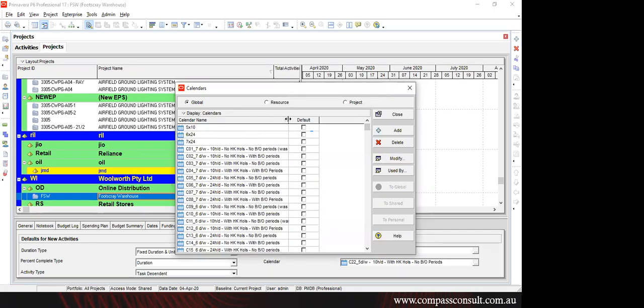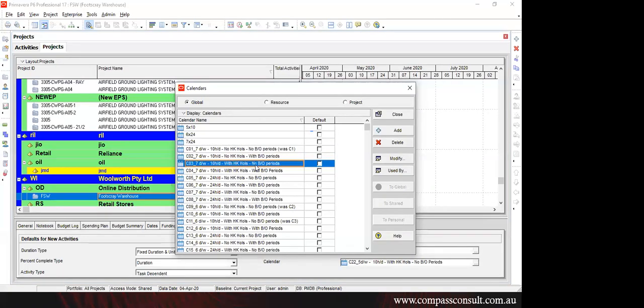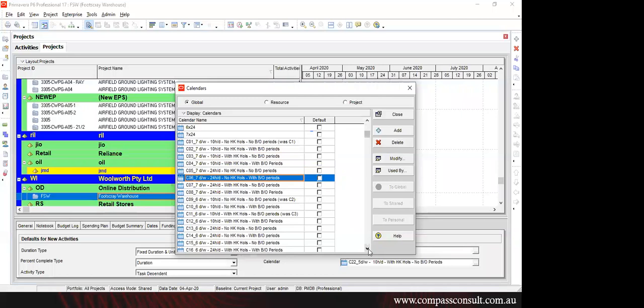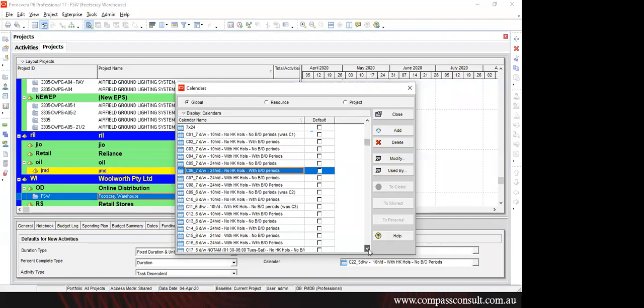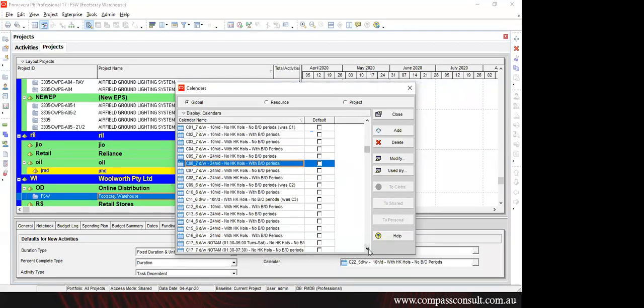Since it's an airport project, there are several different work time periods that we need to follow, because there might be one installation team that has to work on the airport, and airport work timings are quite different from normal projects. Yeah, so they have some calendars which apply only during the runway closures, or at a time when the flights don't operate and all that stuff. Yep. Thanks, Jyotsna.